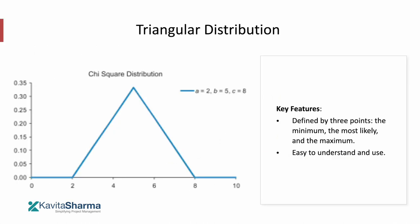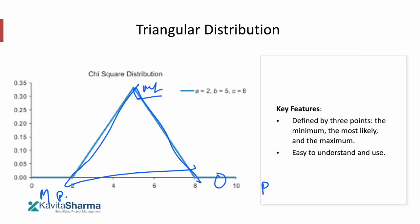Triangular distribution is defined by three points: minimum, most likely, and maximum — very simple. We use it in project management where we define a pessimistic scenario, an optimistic scenario, and a most likely scenario. To calculate the expected value in a triangular distribution: most likely plus pessimistic plus optimistic, divided by three. This gives us the probable duration or probable cost of a particular task or WBS item.